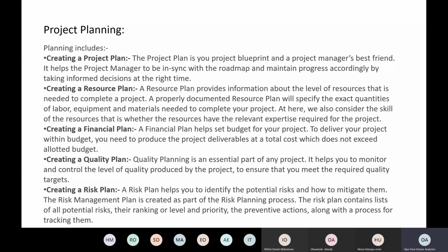So you should be able to know the total cost on the resource on the project, so that you can justify it with the price that the client is paying, and know if you are making a profit or a huge profit on the project, right? Because if the profit margin is very small, then your boss is likely to be wary of you asking for additional resource on the project. You understand? So you must be able to manage your staff cost, your time, your resource cost on the project. And creating a financial plan will help you with that.